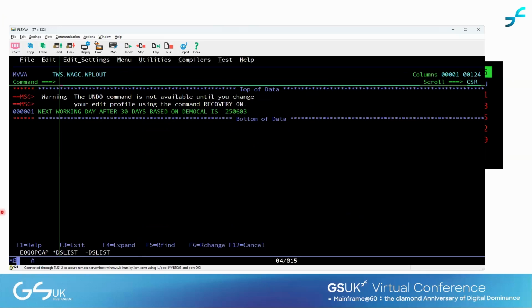And again, I would say this is very helpful because in that case, we have used a custom demo calendar, which is different than the default one. If we had used the default calendar, which has only Saturday and Sunday as free days, we would fall on the 2nd of June, which is a Monday, as the first working day instead of the 3rd, as it is now.